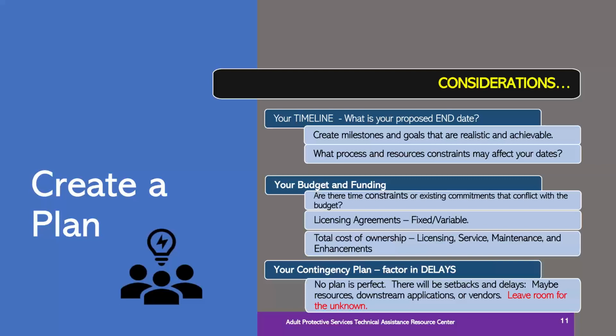And then the next piece we look at is examining the total cost of ownership for the solution. So the total cost includes things like service enhancements and maintenance. Let's just say that you have mapped your product to your processes, and you've started to use it, and you realize you need 2 more fields, or let's say the laws or some rules of your local entity change, and you have to create 4 or 5 more fields. They're needed for your software. So those are things that you have to consider and budget for in your plan.